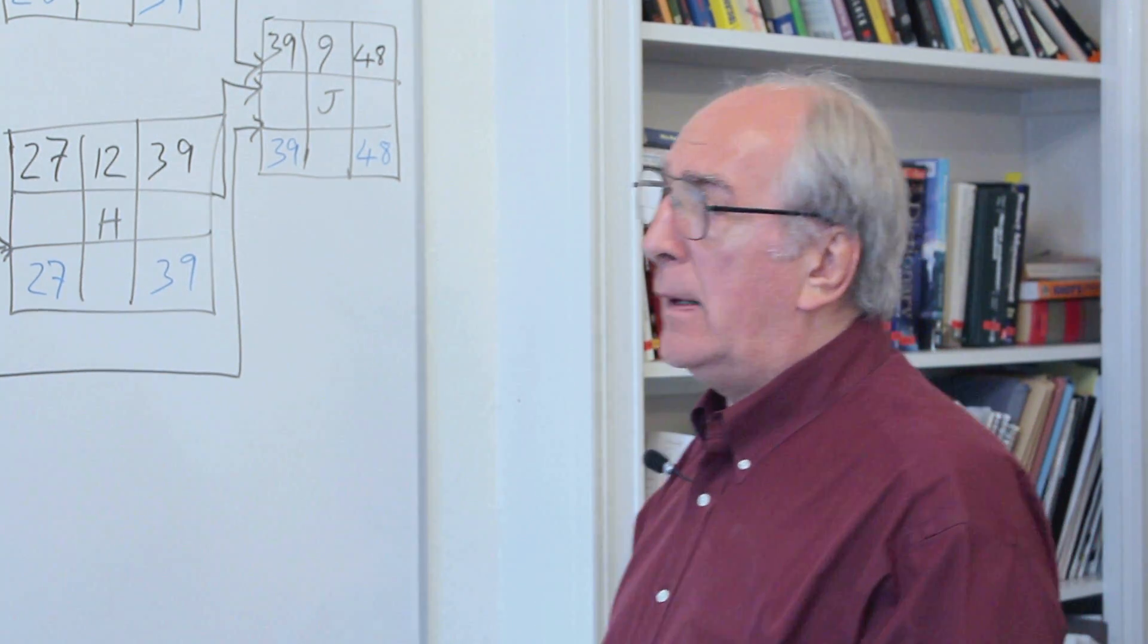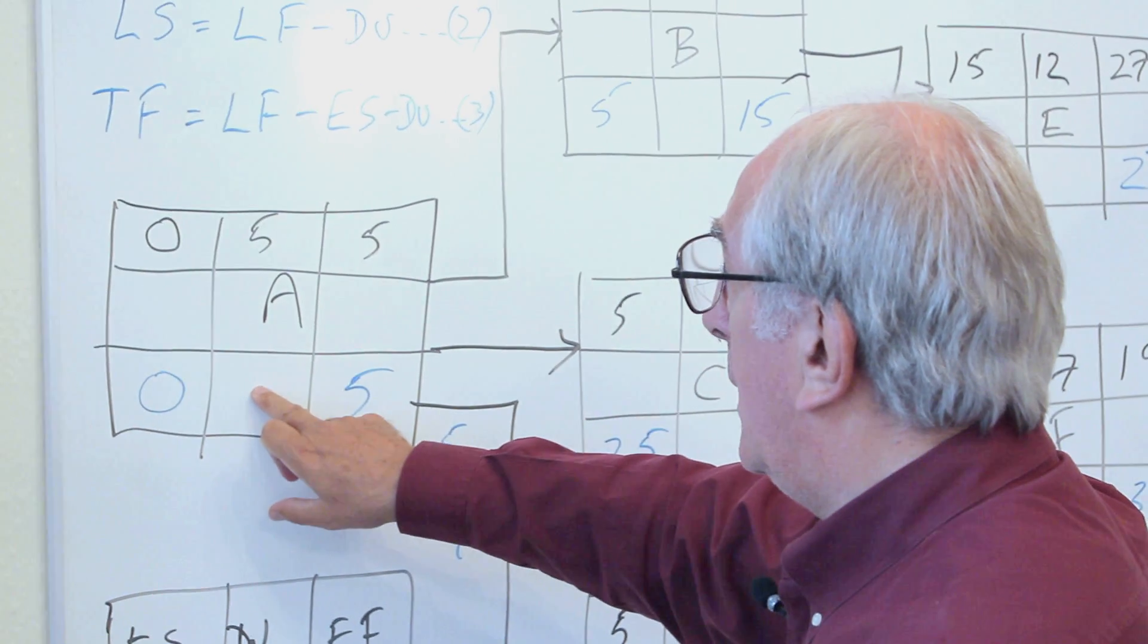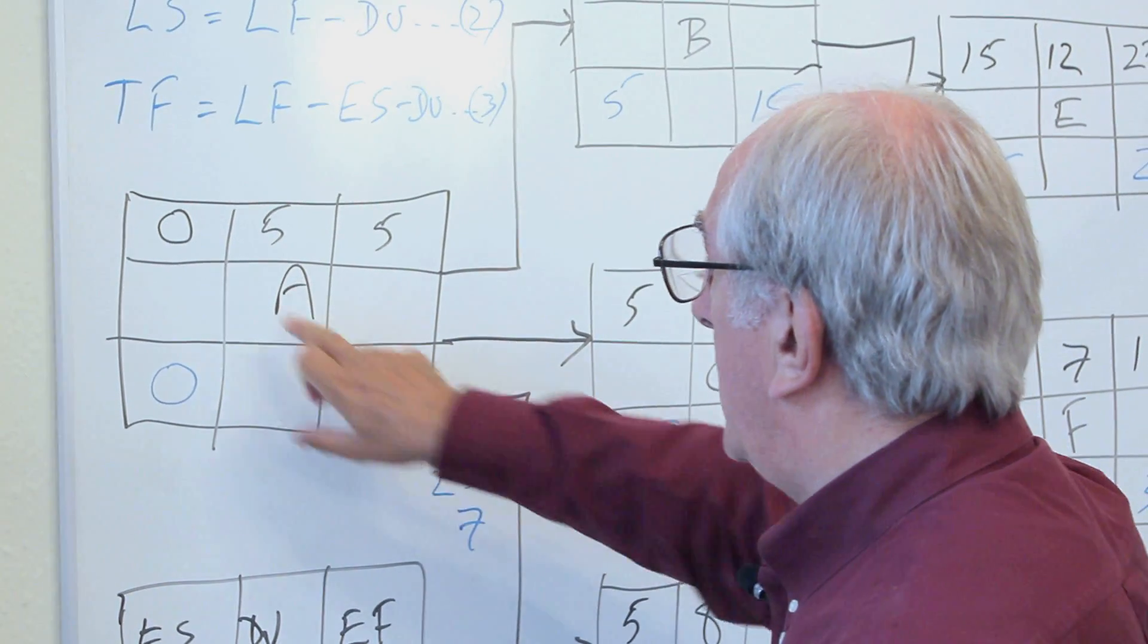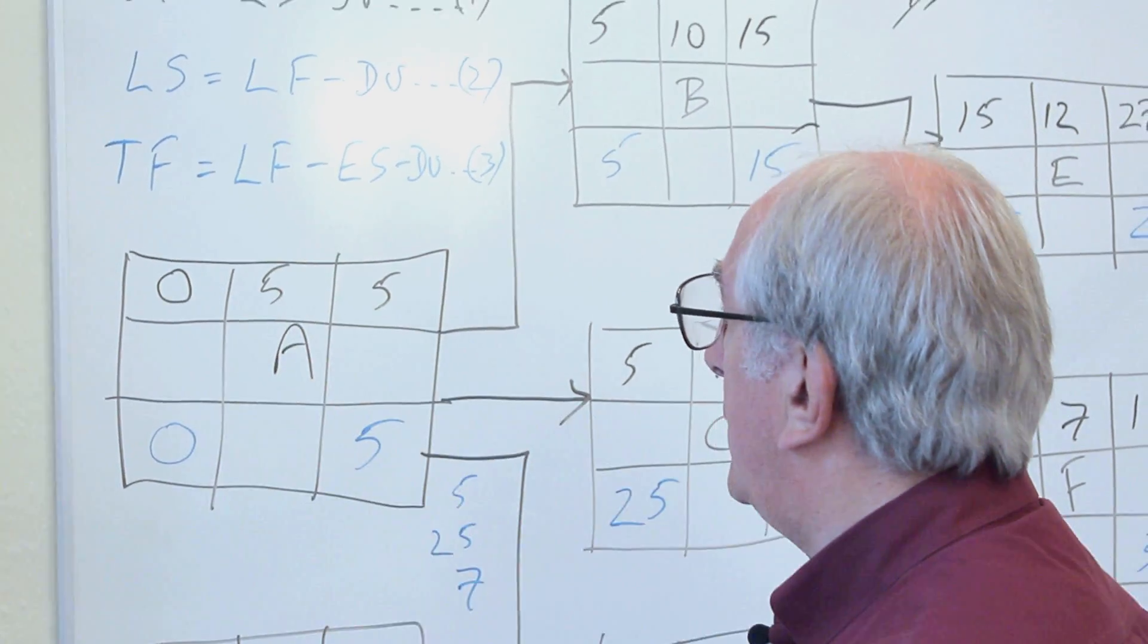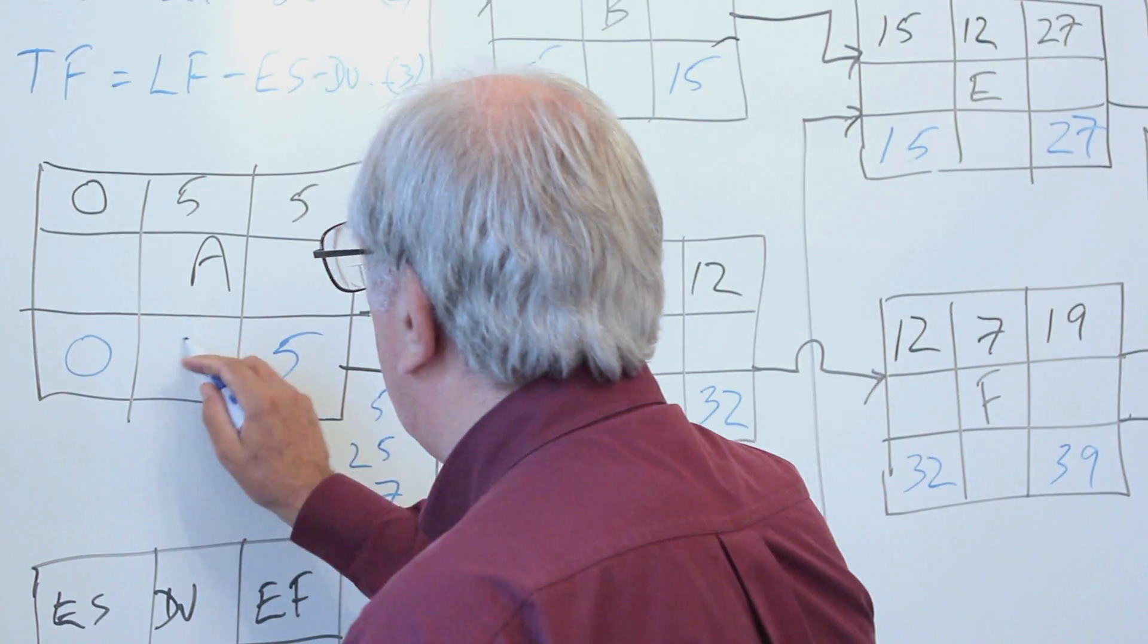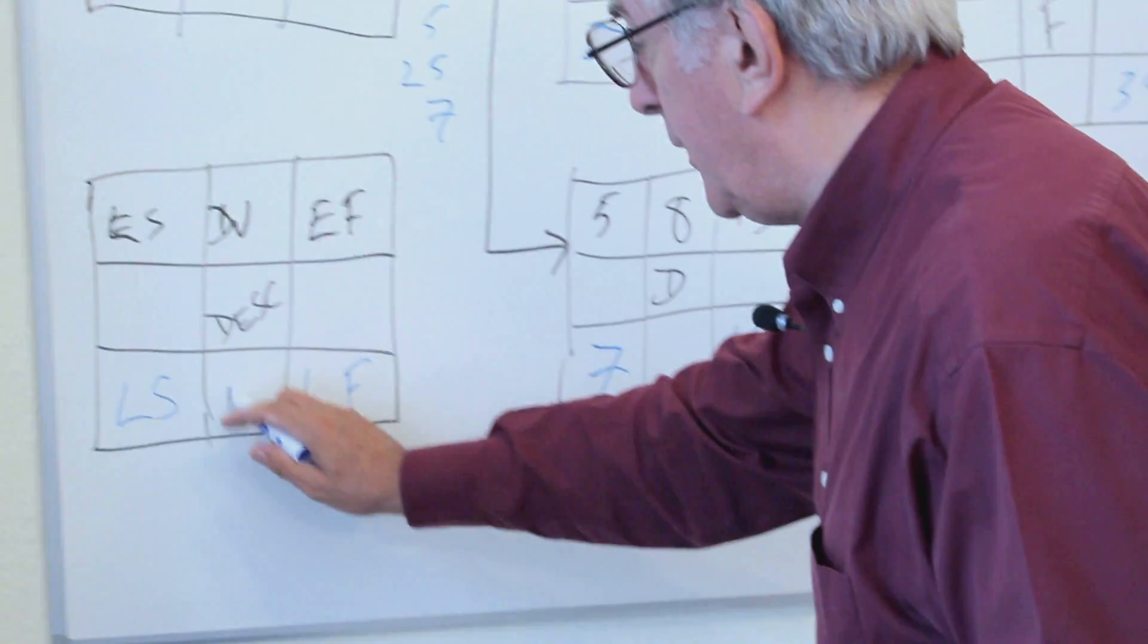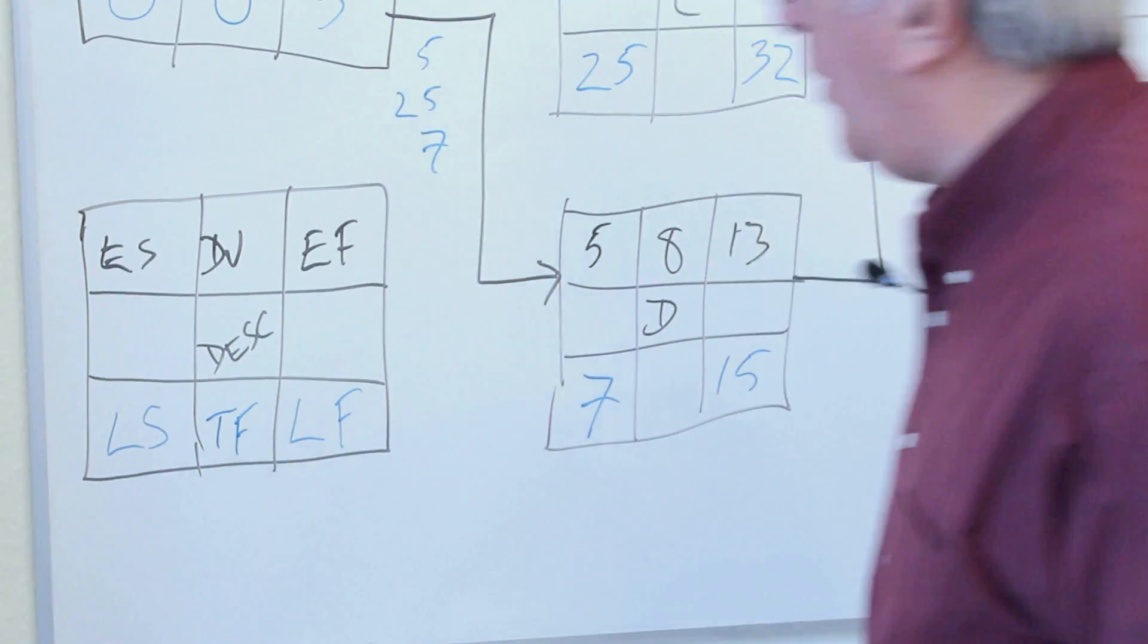So armed with that one, we can start anywhere on here and work out what our floats are. So very simply, the total float on activity A is the late finish of five minus the early start of zero minus the duration of five, and that gives us simply zero. So our float there is zero, and I forgot to mention that that's what goes in this cell down here, the total float, that little cell at the bottom.